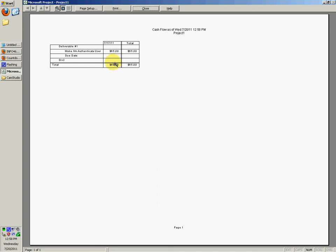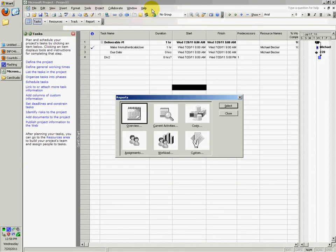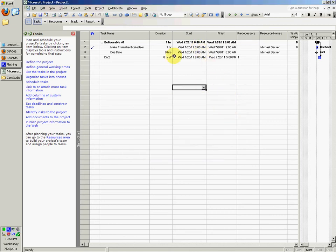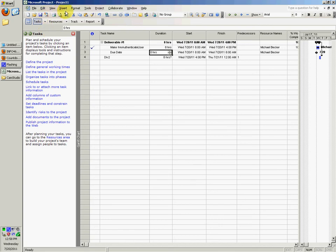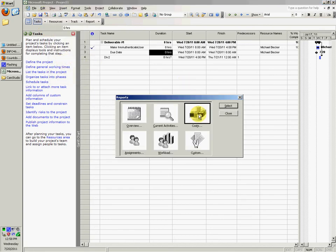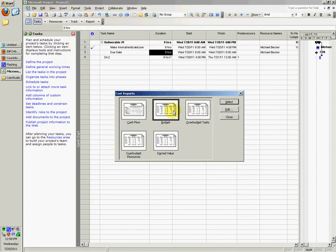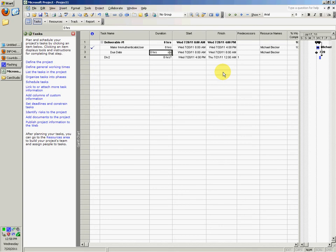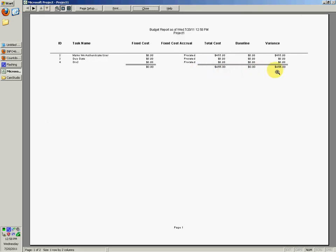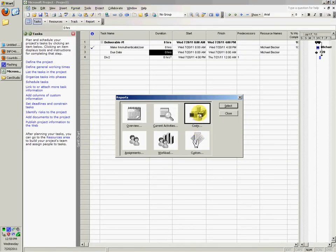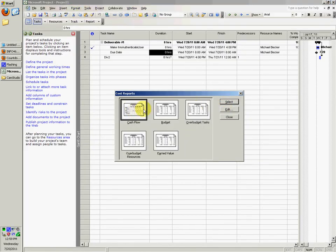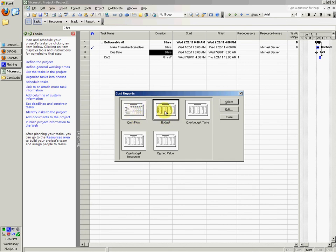Yeah, it's not bad. And of course, if we made this like eight hours maybe, it might look a little better if we went to view reports, costs, budget. And now it actually shows for the number of hours we worked, $455 is what it came out to. And you could also do cash flow as well. But you're not actually getting any money yet, or cash yet, so budget should be fine for now, or you could do cash flow, either one I think works, does the same thing.